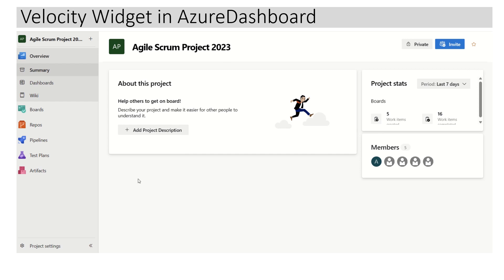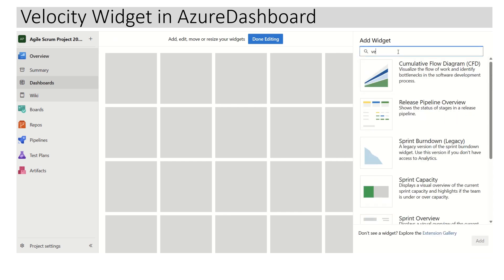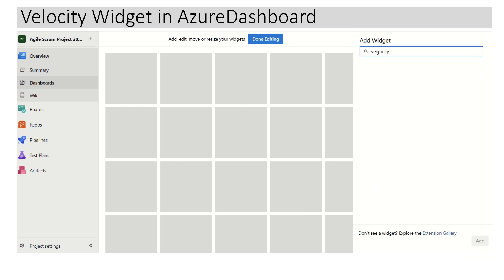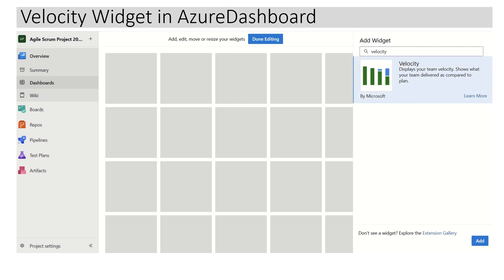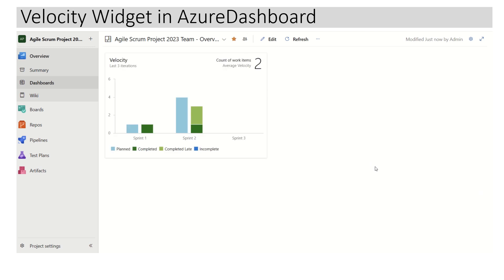In order to configure the dashboard, we have to click on Dashboards from the left pane. Here we can see this is kind of a default dashboard, but right now there are no widgets here. So all we have to do is click on 'Add a widget'. We want to add a velocity widget, so we can type 'velocity' here, select it, click on Add, and click on Done Editing. It has now added the velocity chart based on some default configuration.